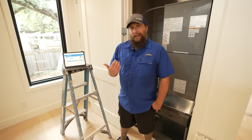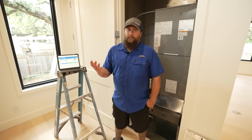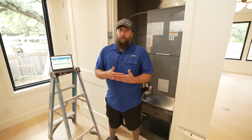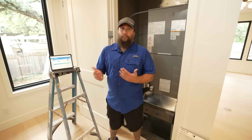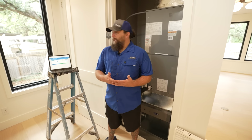We're not going to balance to the average, although you can depending on what climate zone you're working in. If you're in a multi-climate zone where you have multiple seasons, you're going to want to balance to the average, and you're going to want to recommission that home or rebalance it depending on the seasons. That way you're living in your home as comfortably as you can, as optimally as you can.